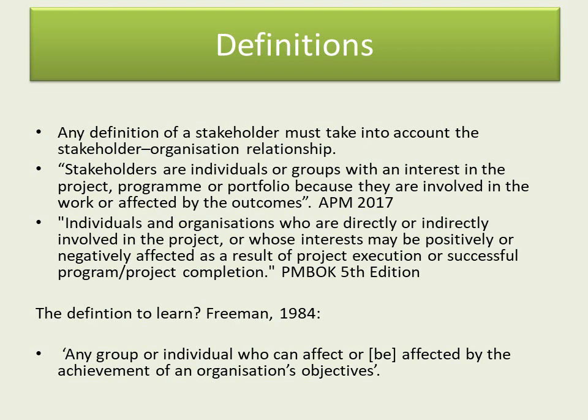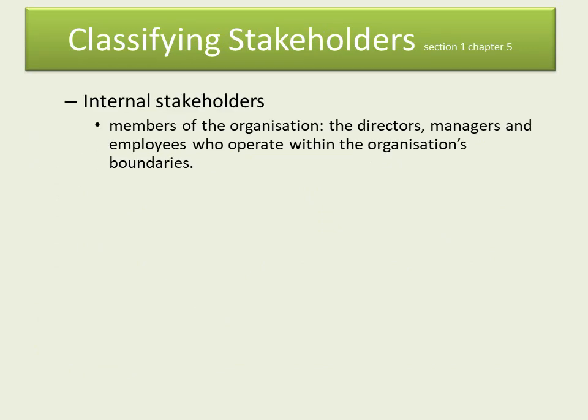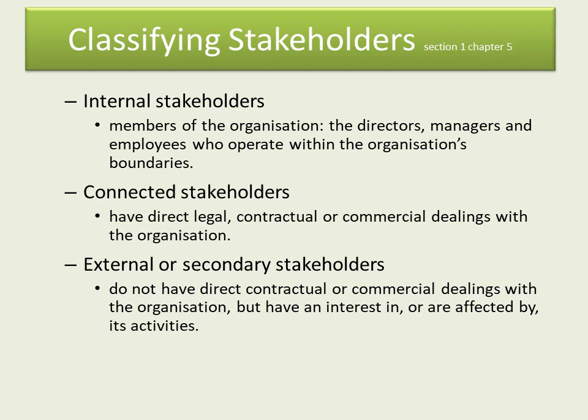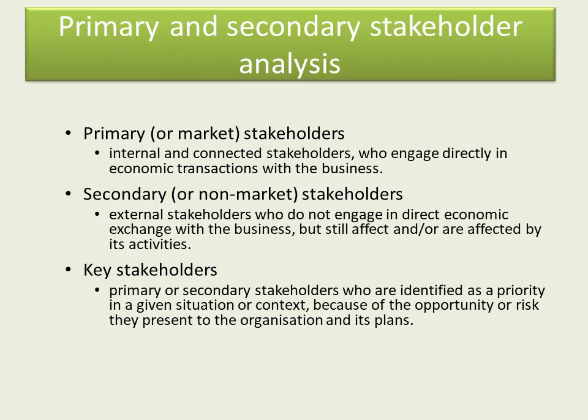We can define a stakeholder and need to classify them. There are several methods: one is internal, connected, and external — where connected would be suppliers, banks, and shareholders, and external would be government, local community, and pressure groups. Another method is primary, secondary, and key stakeholders, where key stakeholders are generally identified through stakeholder mapping.